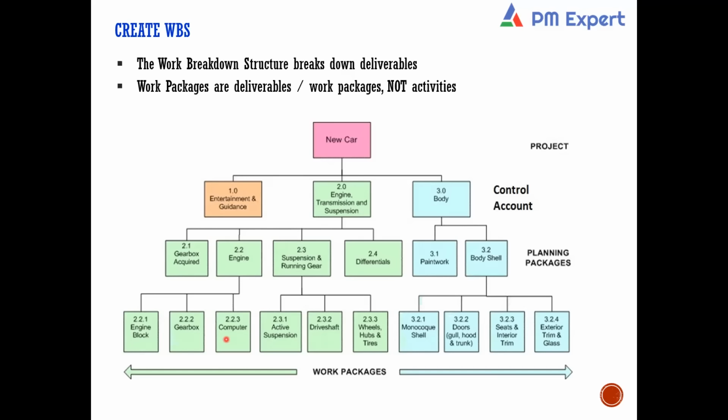They will create the WBS on their end. No. They will create a request for proposal. RFP. Right? They will create an RFP, and within the RFP, they will have a description of this component. And this RFP will be given to shortlisted, selected vendors like Tech Mahindra, TCS, Infosys, or Accenture. Now, after receiving the RFP, these people will be submitting proposals.